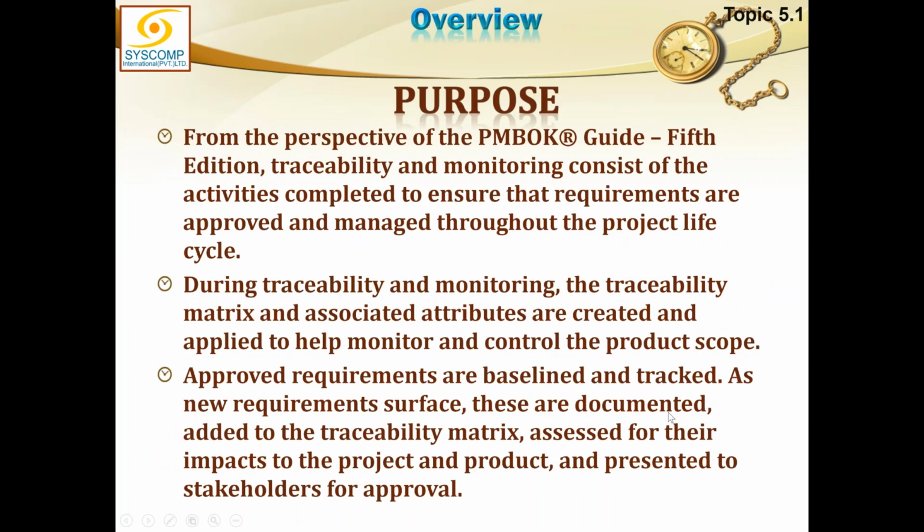Overview of this section. From the perspective of PMBOK 5th edition, because it was written when the 5th edition was established, traceability and monitoring consist of activities completed to ensure that requirements are approved and managed throughout the project lifecycle. So, if the requirements have been approved and baselined, only then can we trace them and manage them throughout the life of the project, because whenever there is a change in requirements, the traceability will detect that, and ultimately we will have to bring that change into the requirements.